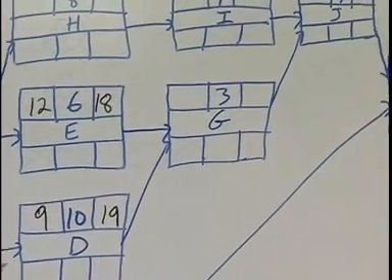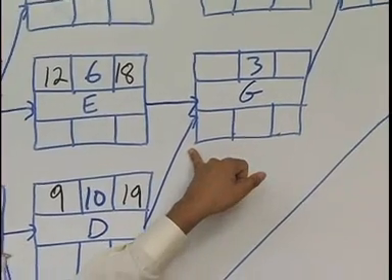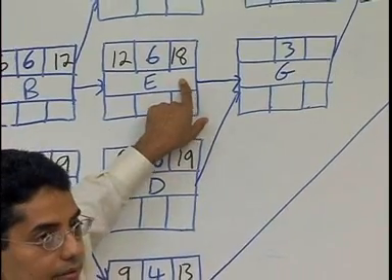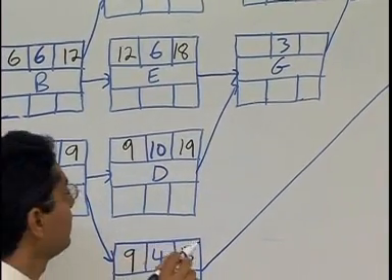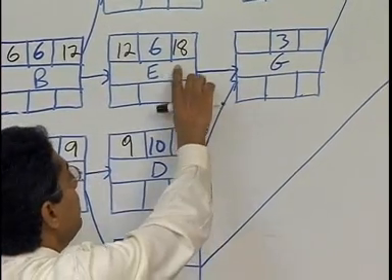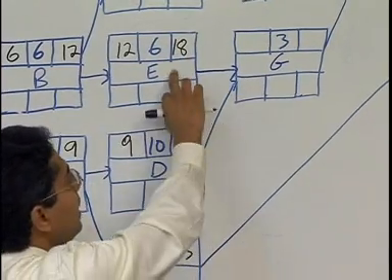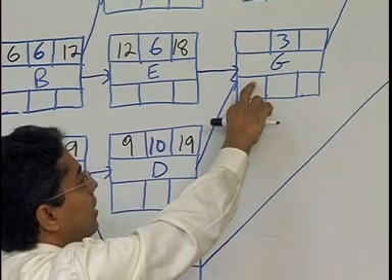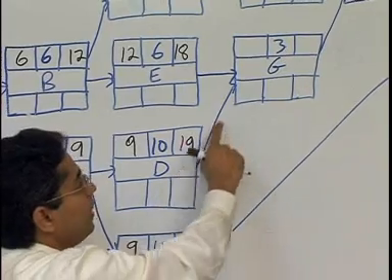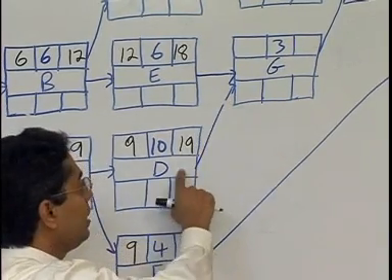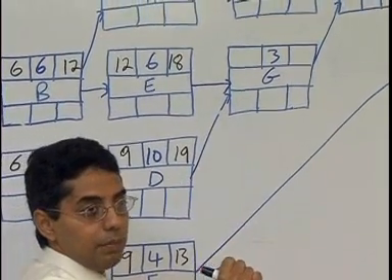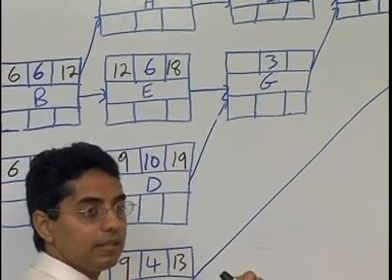Now look at this. G has now 2 activities coming into it. What are the 2 activities? D and E. Now, let's think about this. If I was to use 18, 18 is the number coming from E. It means that E is finishing on the 18th day. Can G start? No, because D is also required for G to start. D is finishing on the 19th day. So there are 2 activities coming into G, but G must have both activities finished before it can start.